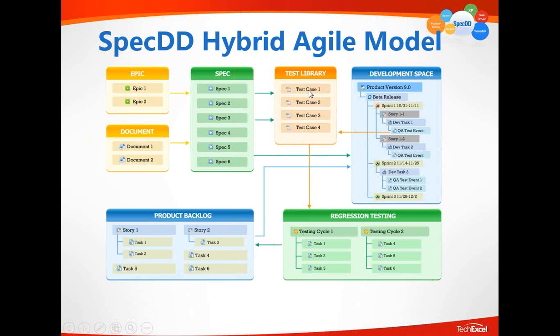That's why test cases 1, 2, representing the testing standard for a requirement feature spec 1, can be used to create subtasks for a development task to represent the testing effort needed to assure the development task gets finished with quality control.